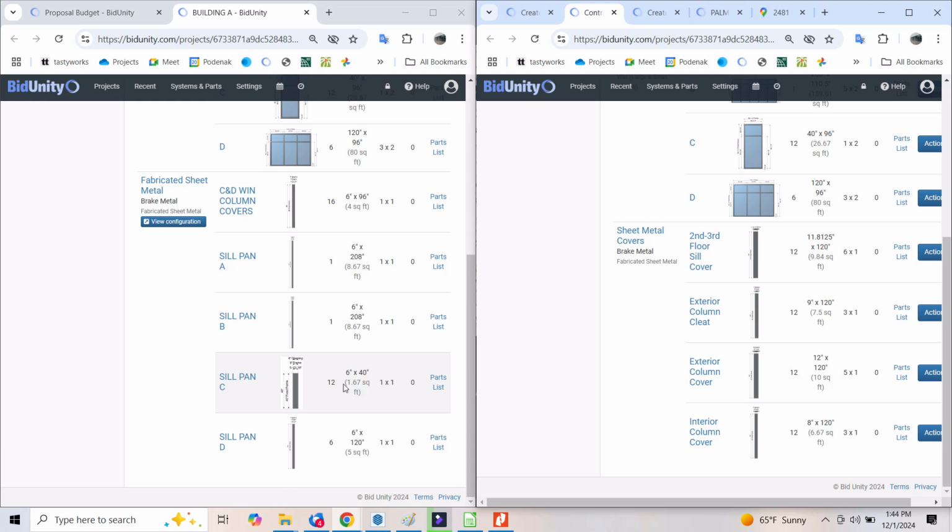So you have 12 plus 6 is 18 120-inch pieces at the sill cover, and I have 12. I know it's not intuitive, but how this is put in, there's an extra 6 pieces. So I don't have these, and here I have 36, so that's 18 plus 6, 24.